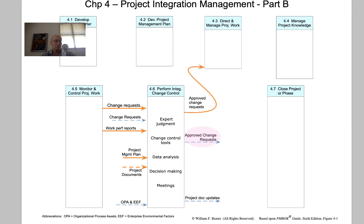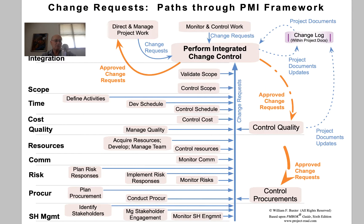Approved change requests also go to one other process — they come into Control Procurements if they relate to procurements.